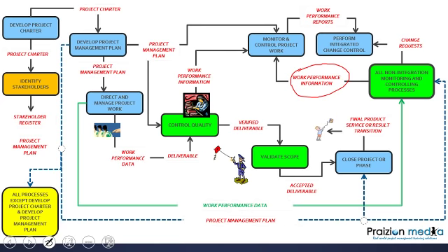If you can get it, that work performance data comes from only one process, direct and manage project work. And if you can get it, that WPI comes from a bunch of places, but it only goes to one process. If you can register that, you're closer to laughing all the way to the score bank on your exam.